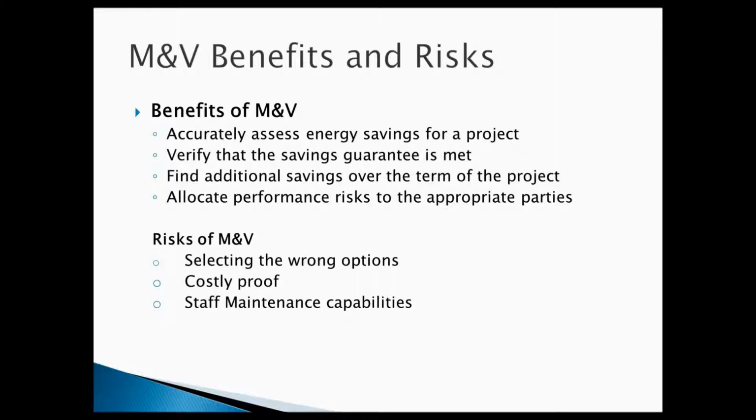Are you satisfied? Now, the only thing to remember here is that once you stop the measurement and verification, your guarantee goes away. Remember that measurement and verification is the foundation of your guarantee.